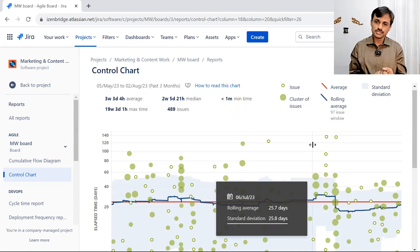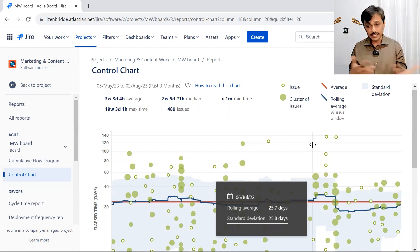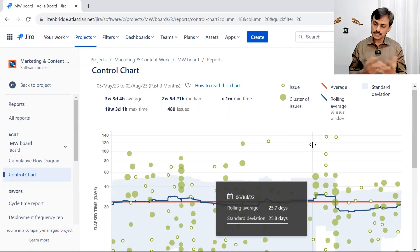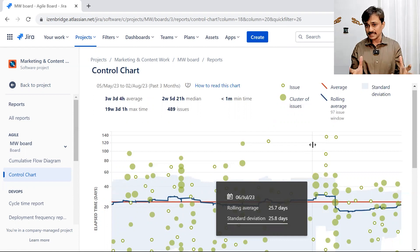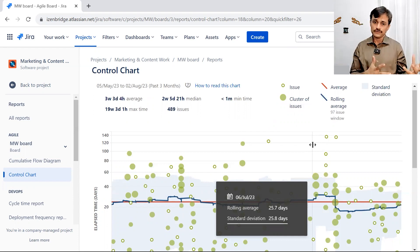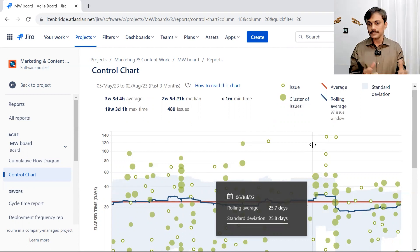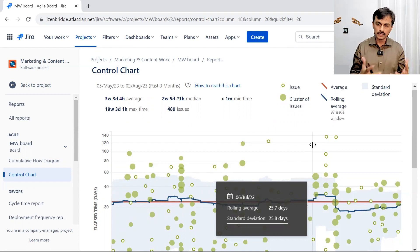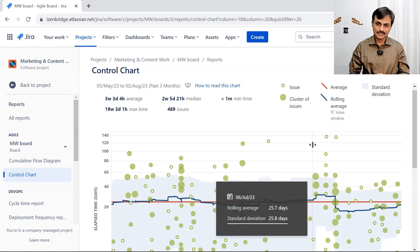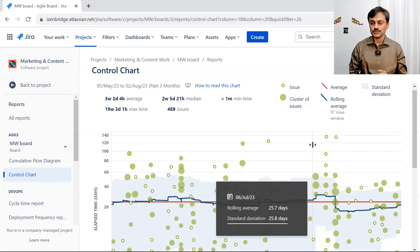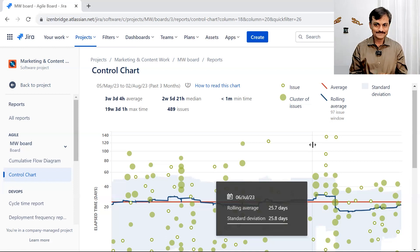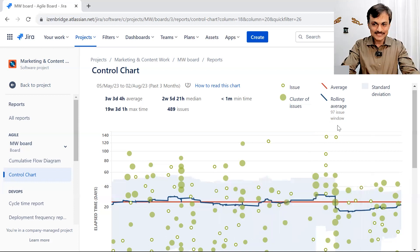We try to find out, especially when we need to give predictability on SLA to other people, how long we are taking on average to finish work. This helps in giving productivity estimates to clients as well as managing internal stakeholder expectations. Basically, this chart is used for figuring out Service Level Agreements using historical data, and it helps in problem solving and diagnosis of our work trend by showing cycle time and lead time depending on the columns you select.